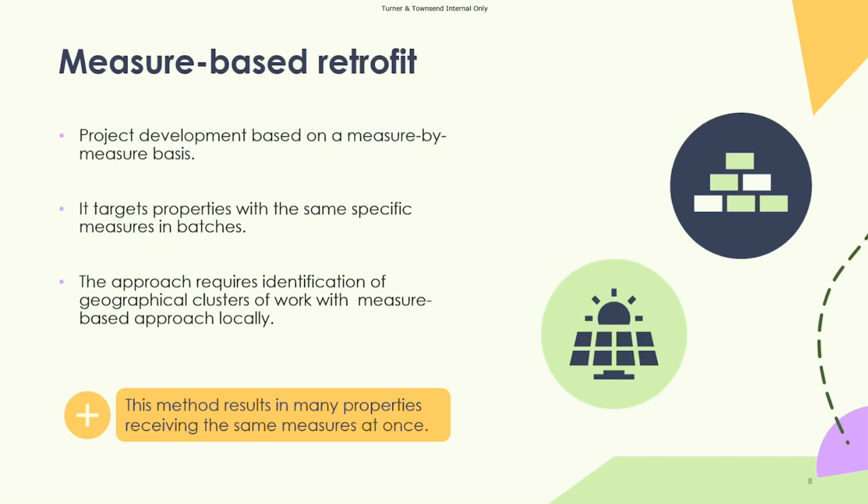So what do we mean by measure-based? This is project-based development on a measure basis. We use this quite a lot at Tanner and Townsend when we're developing strategies for organizations. When you've developed retrofit programs, you create building passports for what measures or solutions you provide to a specific archetype or home. So you package those measures up and say, okay, for this archetype, it's a cavity wall property. So we know it's likely going to need cavity wall insulation, maybe some boroscoping to do initial checks and assessments of the properties. And we know it needs loft insulation and windows and doors. Those are your package of measures that you're likely to roll out.